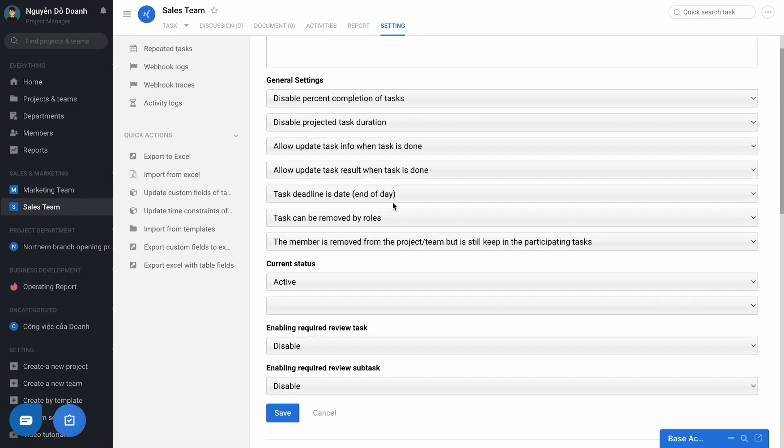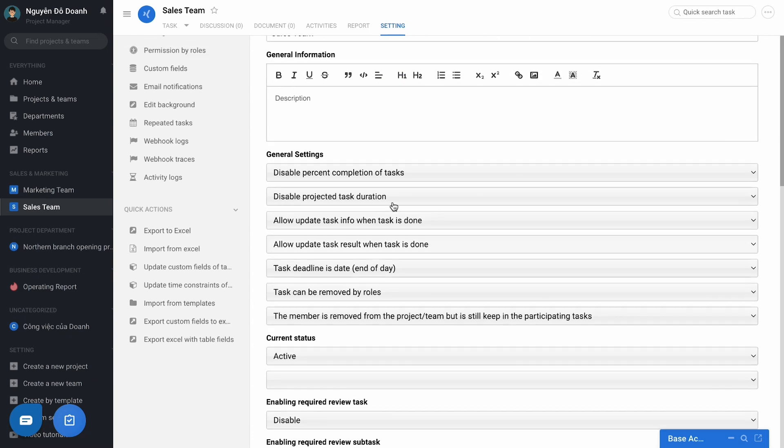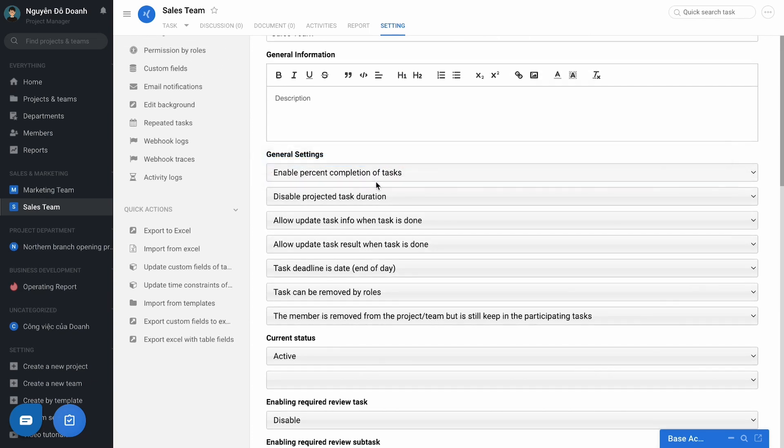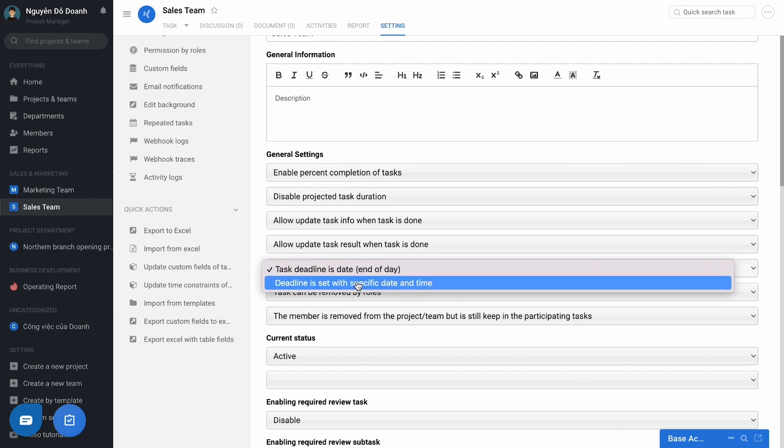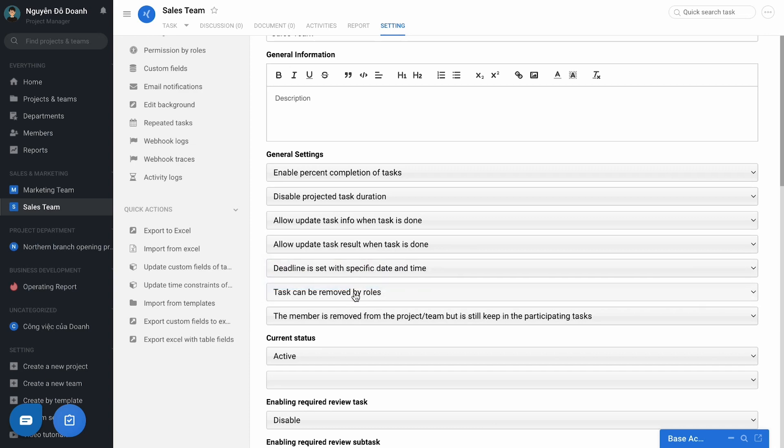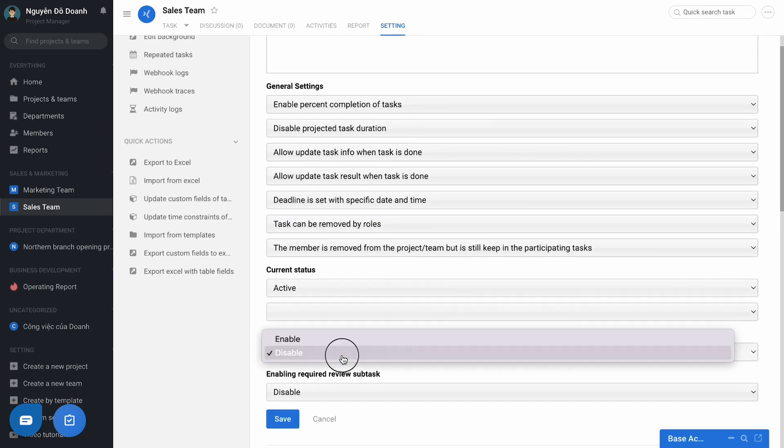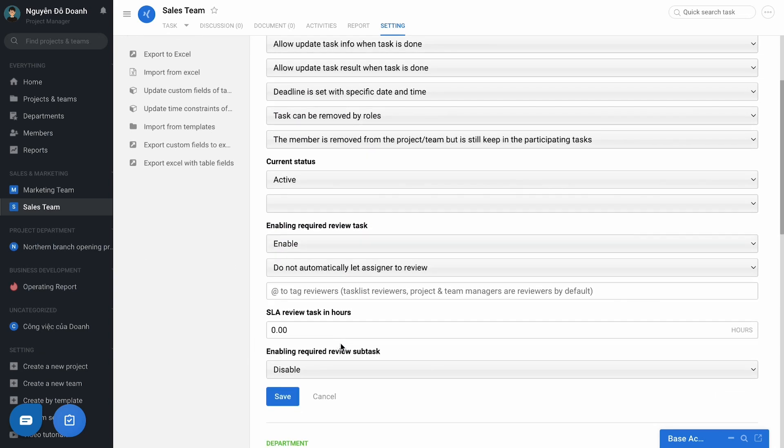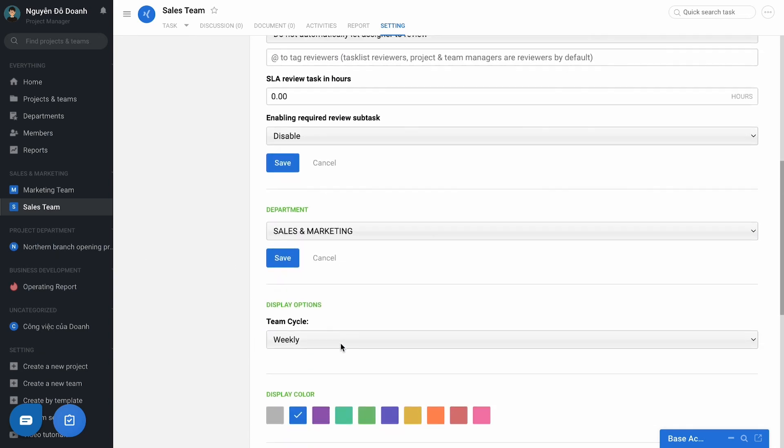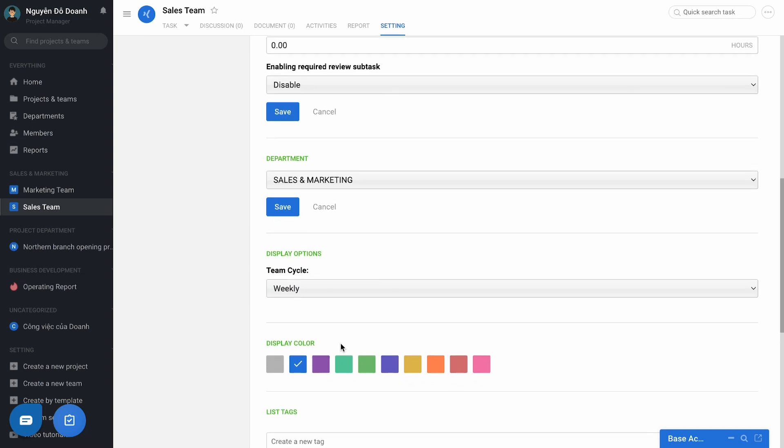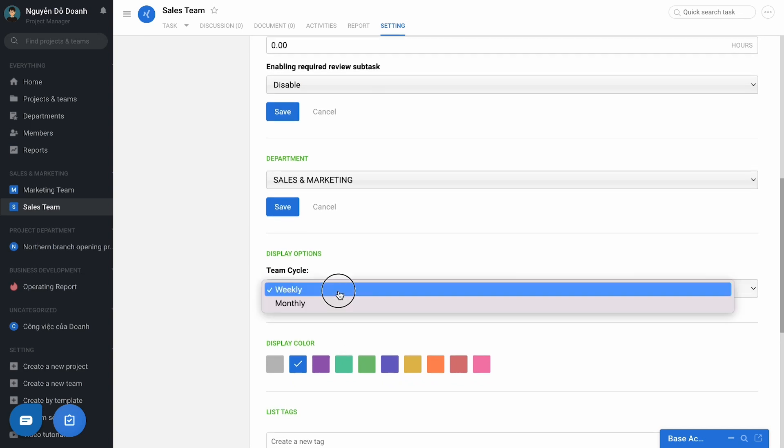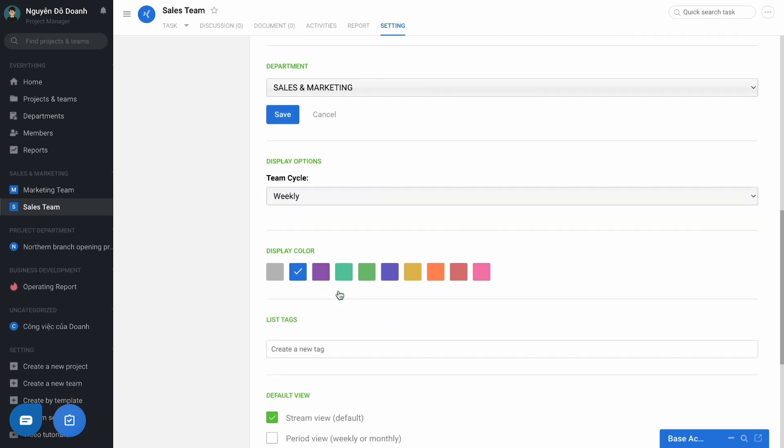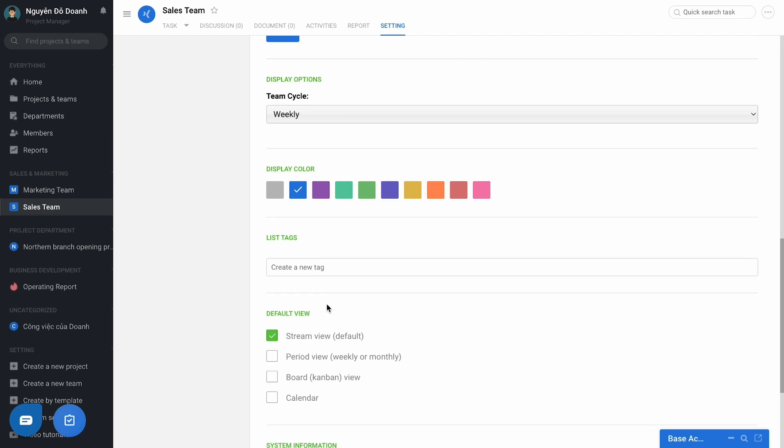Some typical advanced features such as enable percent completion of task, the deadline is set with the specific date or time, enable link requires review task, select the display time cycle for the period view of team, set the default view of project or team.